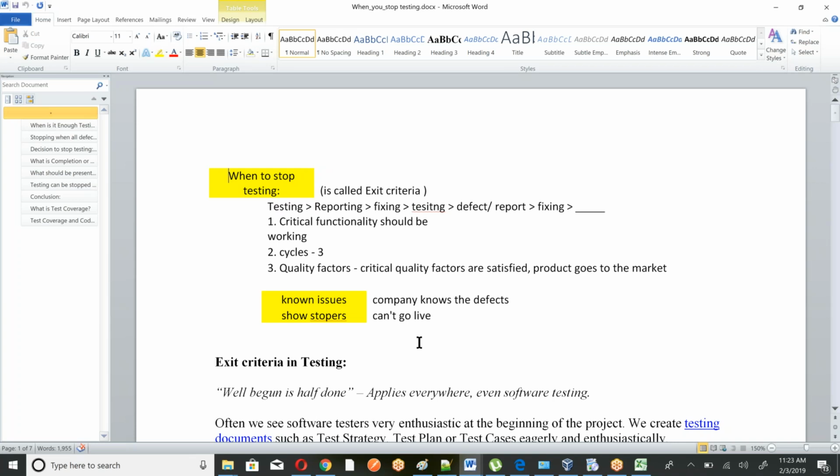That means it's critical. How long is it going to be pending? It should be updated. It should be done. But somehow it is not done yet. So that is a showstopper. That time they will decide, and a whole team meeting will be arranged. It is called a go or no go meeting, or go live or no go meeting. There are a lot of ways, it's company to company. It depends on how they call this meeting.